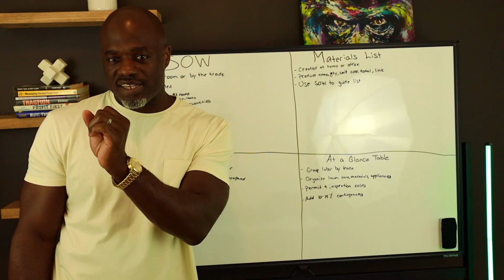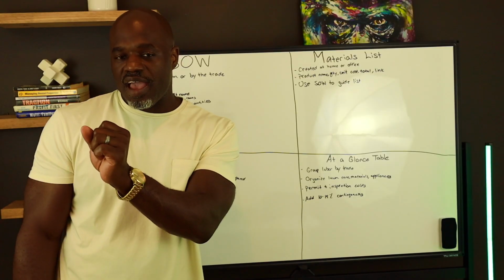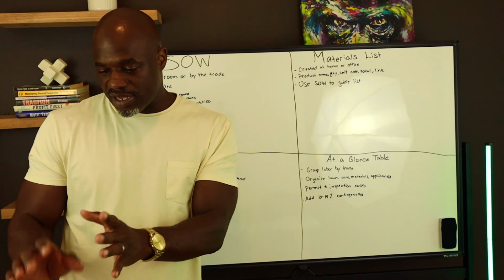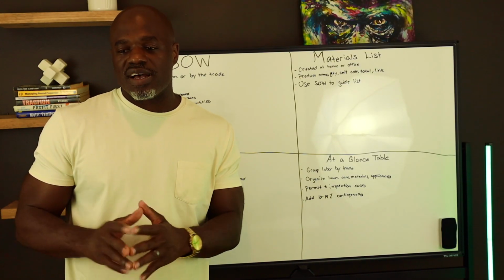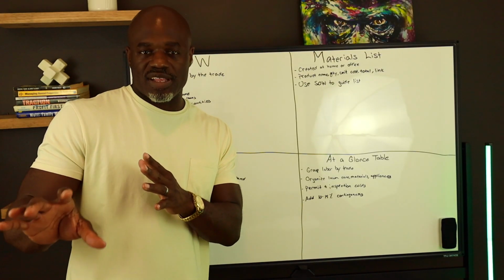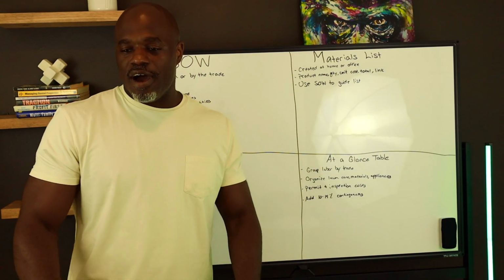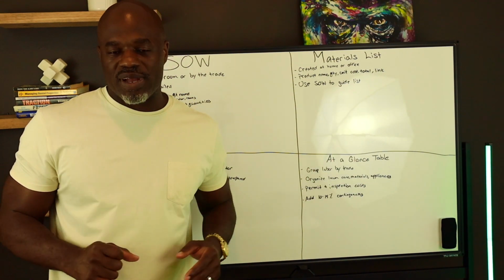I still got to pay our glazer $500 to come and glaze the bathroom. I still have to pay our cleaner $350. All right. So I about $1,000 is my liability that's still on this job. Check the bank account. Okay, cool. I still got that in there. And then you work that all the way down to zero.